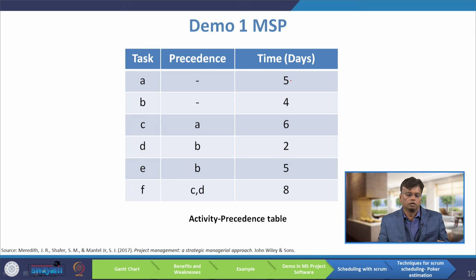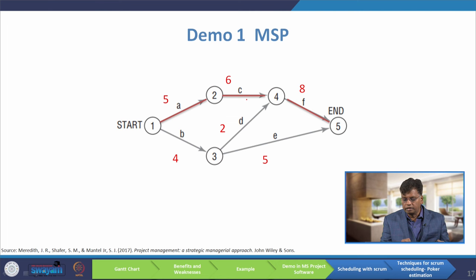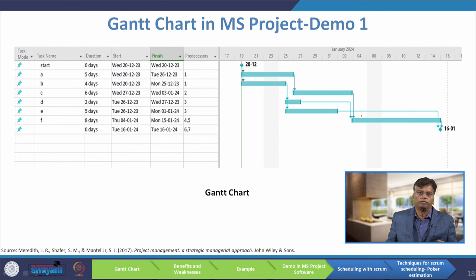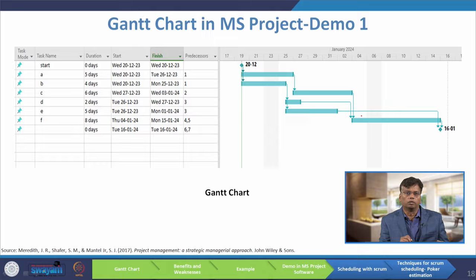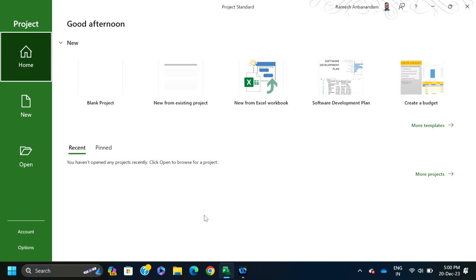For the given problem, I have drawn the precedence diagram. The critical activity path is A, C, F — with 11 plus 19 being the largest path, that is the critical path. Now I am going to give a demo with the help of MS Project on how to construct the Gantt chart for the given problem.